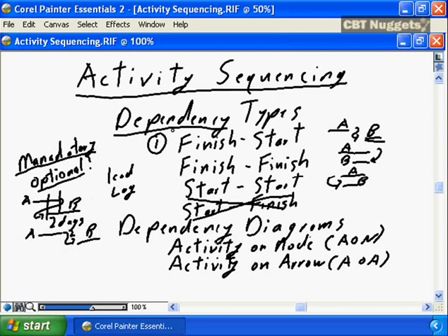So work on the dependencies. Ensure you have the right dependencies created for your project plan, and that only the mandatory dependencies are created will result in the simplest, easiest project dependency diagram for you to debug. What is a dependency diagram?